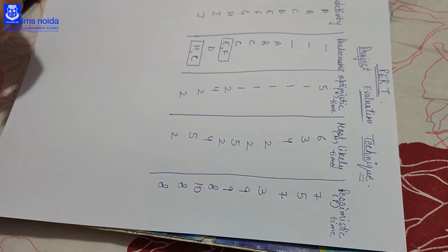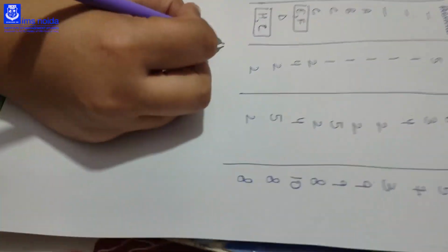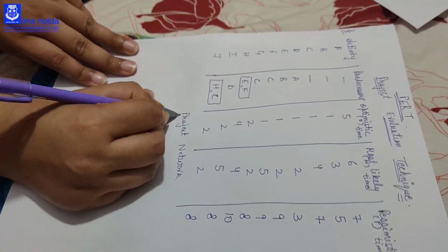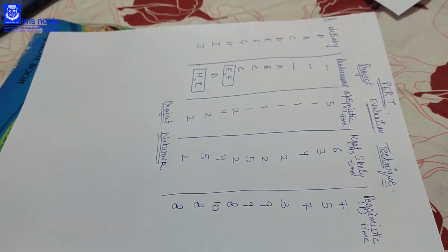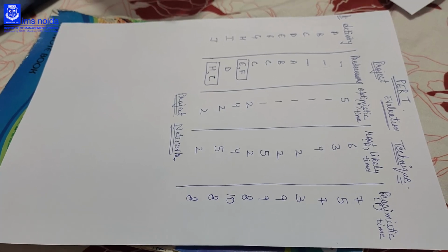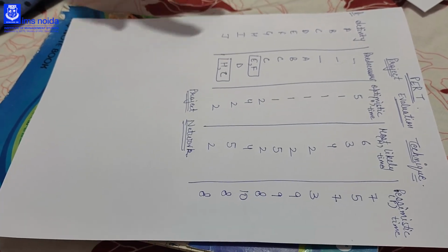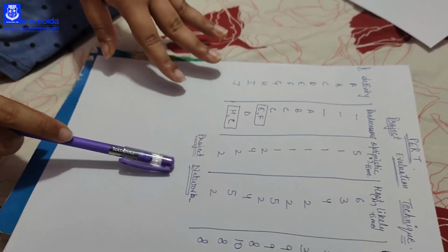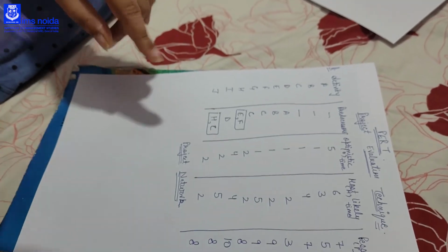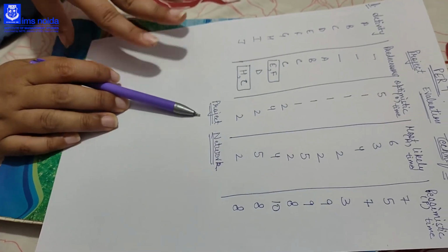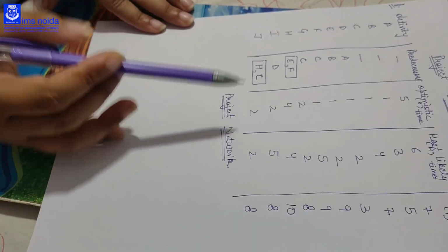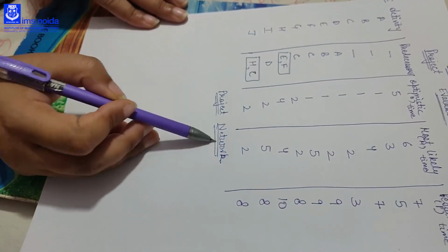So first of all, here also we will make the project network. It is made in a similar way to the critical network. In the CPM method, the network we made is the critical network, as it is called the critical path method. But in PERT, the network is known as the project network, as this is the Project Evaluation Technique method. So let's start. It is made in a similar way to the critical path method. With the activities and predecessors we will make the project network.